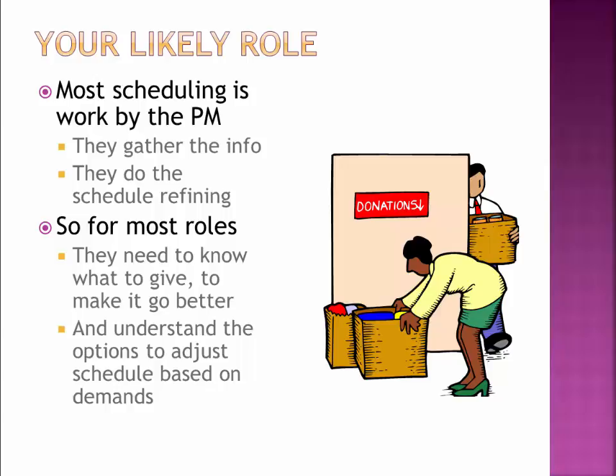Well, it wasn't their fault. They wrote down what I told them. It was my fault, where what I really should have said was, I'm going to do the login functionality. So I code the database for the login functionality, I code the code for the login functionality, I test the code for the login functionality. Or I could just say I do the login functionality. I don't need to break it down to that granularity. So instead of saying code the database, code the backend, test everything, what I should have said is code feature 1, code feature 2, code feature 3. And then that would have been more appropriate to the thing I would be working on.